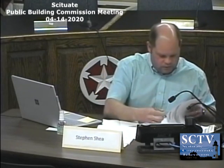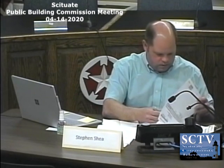So the next invoice we have in front of us is from Bargman Henry Architect for their February services. This was the monthly cost for where they're at now, site visits. Vertex has reviewed the invoice and has recommended paying it. The invoice amount for February for Bargman is $19,124.80. It's for services associated with construction administration, basically. I think it brings the contract to about 24% of the full contract. Are there any questions or comments on the February bill?